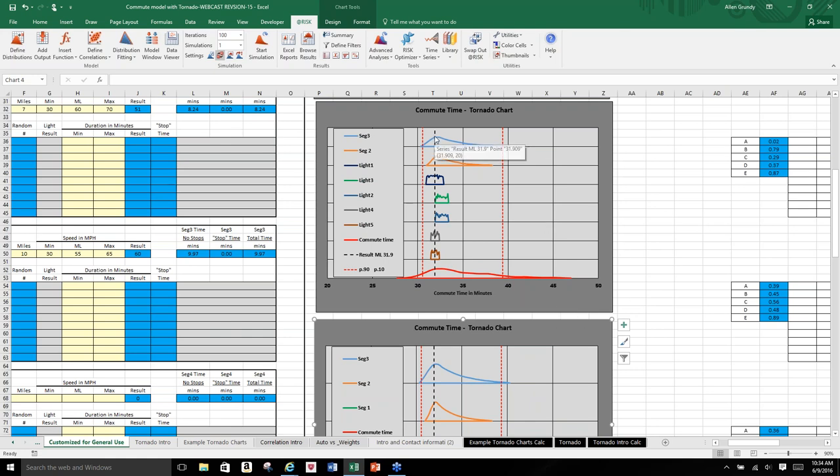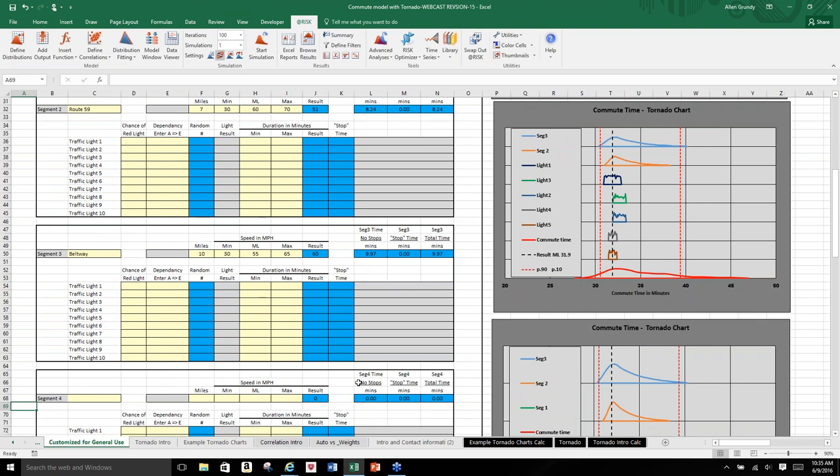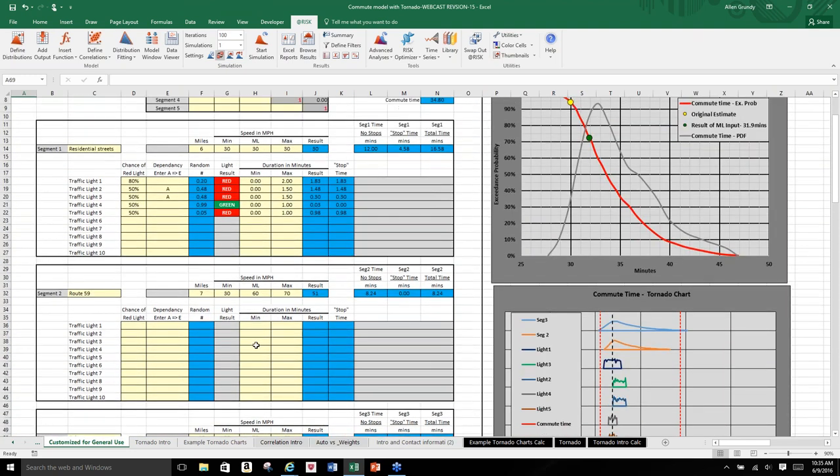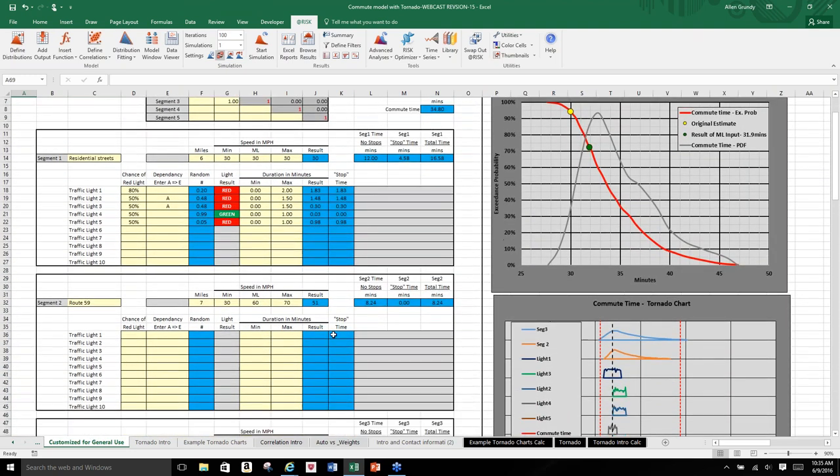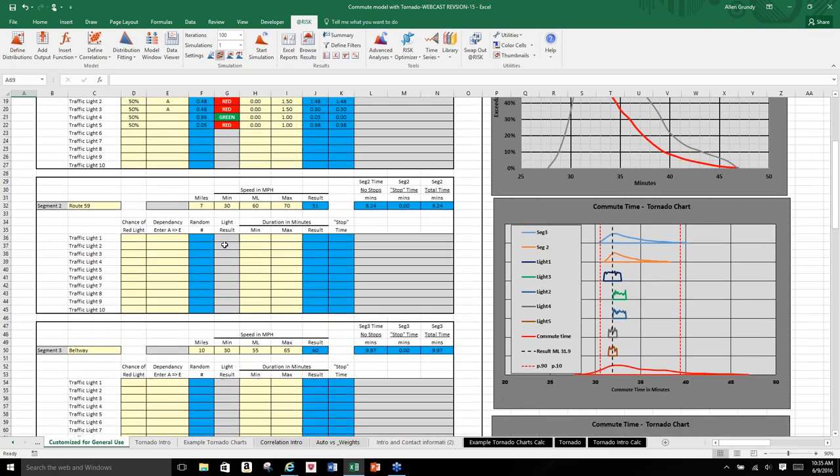You see here that segment 3 is the one at the top. You might have thought, if you look at the input, that segment 2, since it has the widest range, going from 30 to 70, while segment 3 goes from 30 to 55, would be the most uncertain. So you might have thought at first glance that there's a mistake there. But if you look at the miles, segment 2 is shorter, segment 3 is longer, so sure enough,